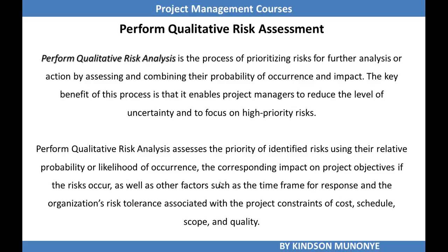Also take note that perform qualitative risk analysis is performed regularly throughout the project life cycle, as defined in the project risk management plan. Sometimes this can lead to perform quantitative risk analysis, or it may even lead directly to plan risk responses.